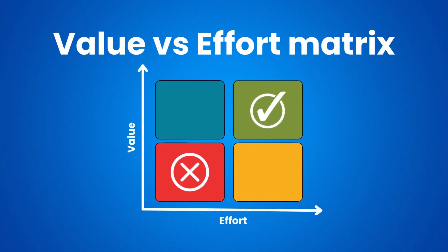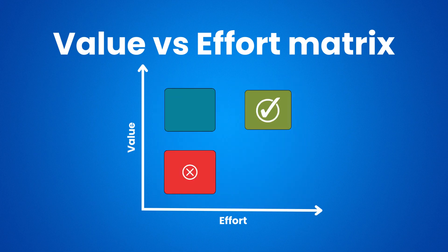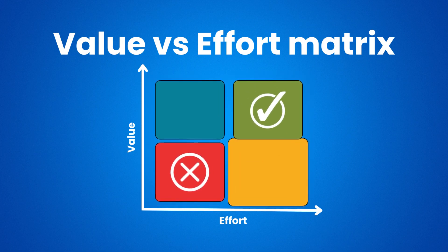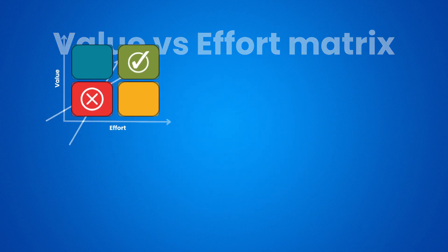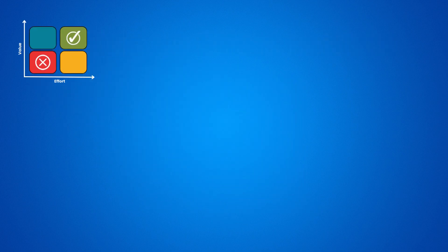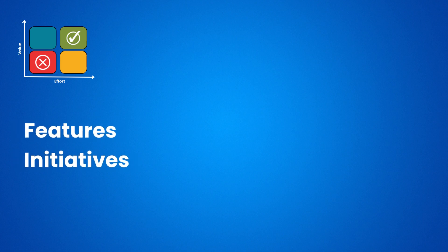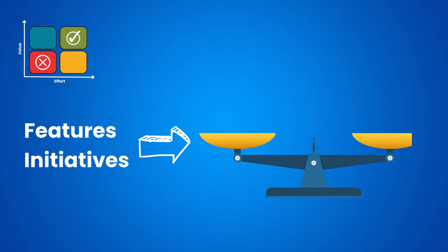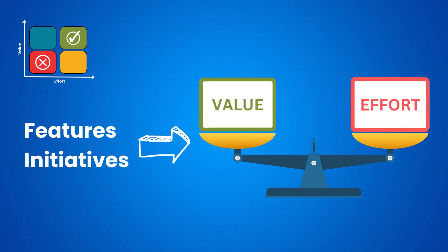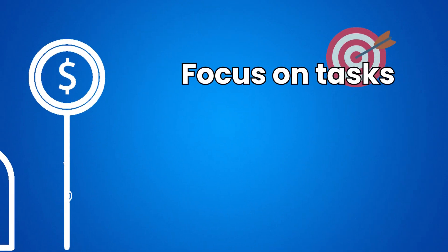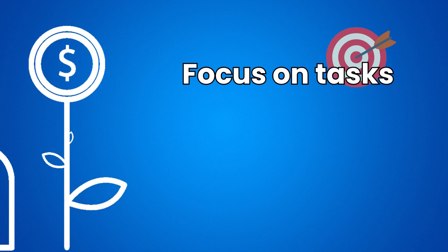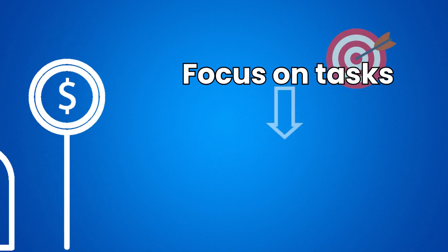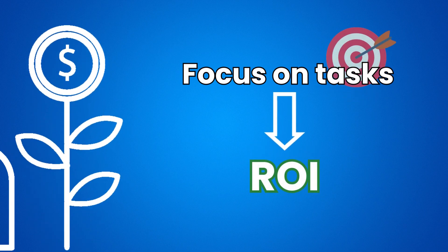Last but not least, we will see how the value versus effort matrix holds up in this list. The value versus effort matrix is a simple approach among prioritization techniques, and it involves taking your features and initiatives and quantifying them by using value and effort scores. In other words, this method helps teams focus on tasks that bring the greatest return on investment.